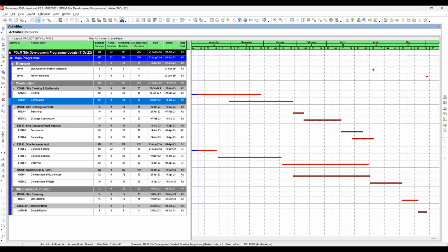So let's go to the finish date. The finish date is the actual finish date for completed activities. So if the activity is completed, it becomes actual. You can see the suffix A here if it is already completed. But if the activity has not yet completed, that is the projected early finish date of the uncompleted activities.